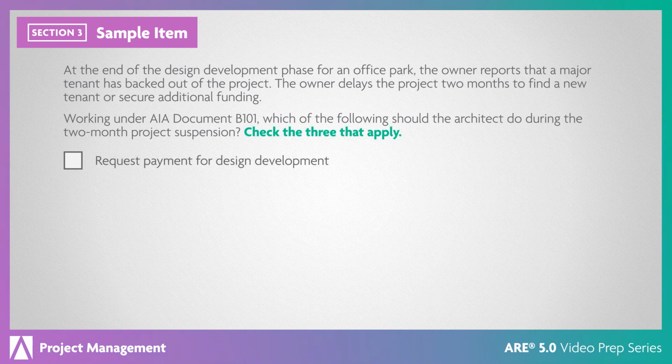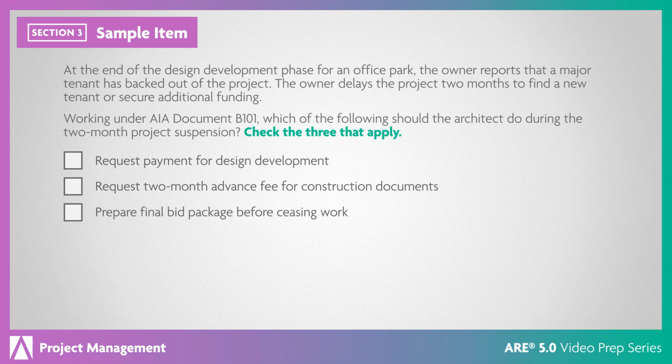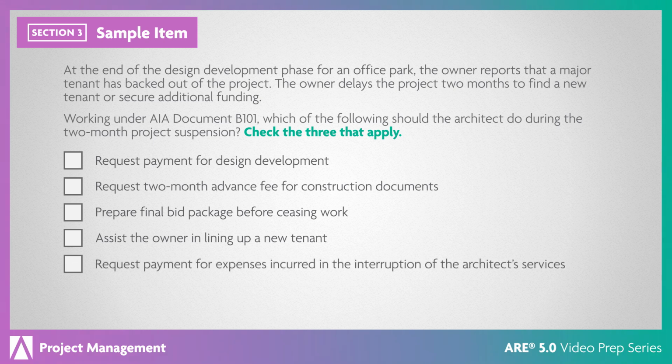Request payment for design development. Request 2-month advance fee for construction documents. Prepare final bid package before ceasing work. Assist the owner in lining up a new tenant. Request payment for expenses incurred in the interruption of the architect's services. Submit revised schedule for when the project resumes.